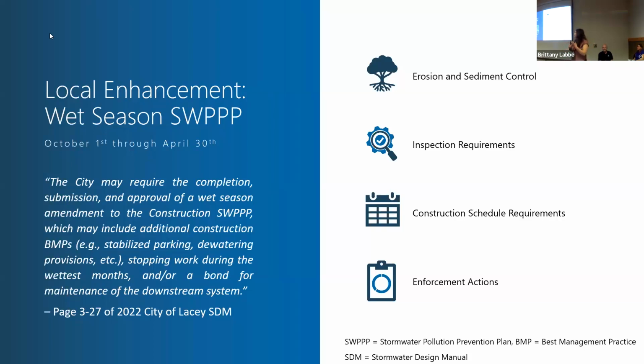Now I'd like to take a little time to talk about construction schedule requirements. As many of you know, construction tends to go behind schedule. And so if the construction schedule ends up extending into the wet season, this wet season SWPPP is required. It must cover activities that would occur during the wet season and how to prevent sediment from leaving the construction site and impairing local water bodies.